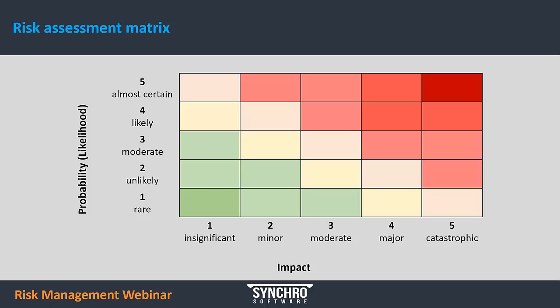I'll give you an example. If you think about floods, a flood will bring specific losses to the crops — losses we can calculate and place within this matrix, for example at a moderate impact. But the same size flood might have a catastrophic outcome if we talk about a nuclear reactor. If the flood destroys a nuclear reactor, the impact will probably be catastrophic. So once again, the risk assessment will be just a part of the bigger risk analysis process.